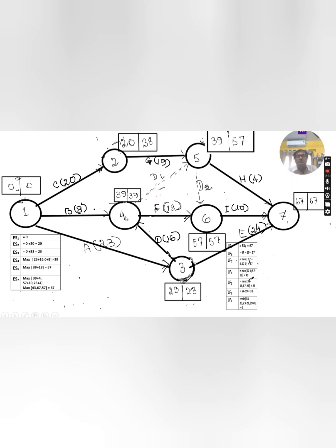Now for node 4, ES4, you see the connecting tasks in this case, not 1, 2, but 1, 4 and 3, 4. That means you must complete this activity and also this activity. That's why, what will be the earliest start time of this node? Because you have to complete all the activities. You cannot leave any activity. That's why you have to take the largest time required